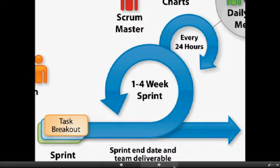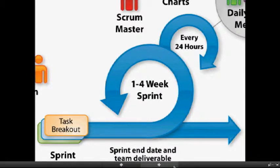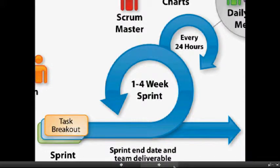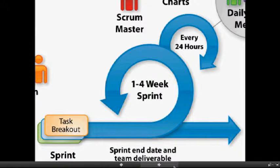After the Product Backlog is set, then comes the Sprint Planning meeting. In that meeting, the team comes up with a Sprint Backlog, which is like a to-do list to be completed during the sprint.